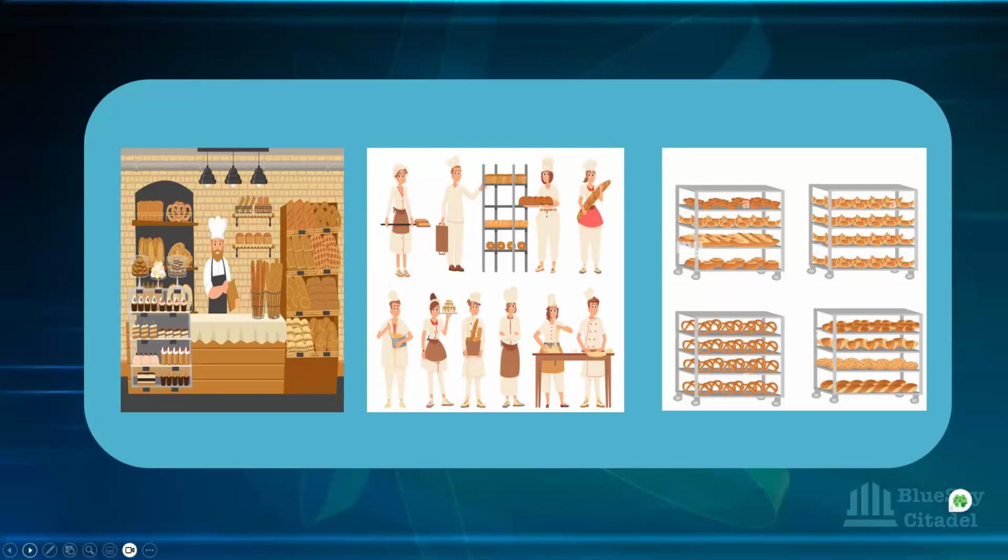As a scrum master, you're able to negotiate to say, oh, sorry, this sprint we don't have full capacity. We have about 50% capacity. That means we're not going to be able to do the 10 stories because half of the team are not around. And then you negotiate and say, can you just let us know the most prioritized work that needs to be done out of that 10? That is what we'll be able to do. And definitely, what you've brought up is reasonable.